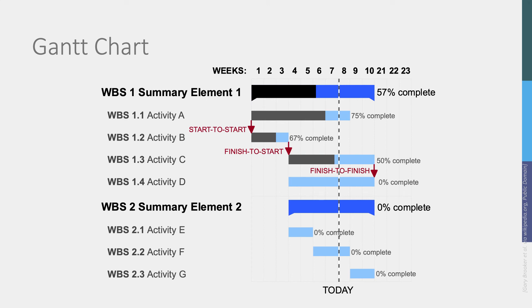In Gantt charts, the level of completion of a task is often indicated by shading the completed percentage of a task.